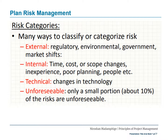First, external risks — as the name suggests, these are external to the project and the organization you are part of. Examples include regulatory, environmental, government, and market shifts, which can all create external risks. Internal risks are risks within your organization or the project context — such as time, cost, or scope changes, inexperienced staff, poor planning, or people issues. The good news is that you have control over internal risks because they are internal to you.